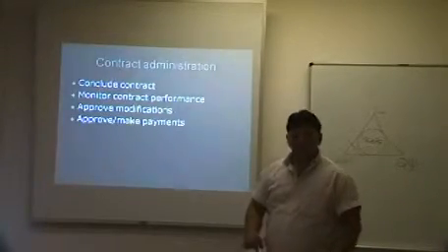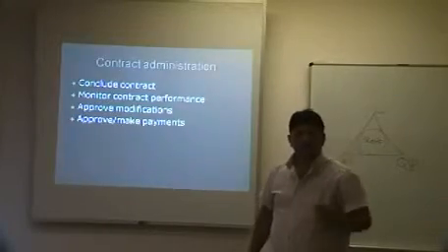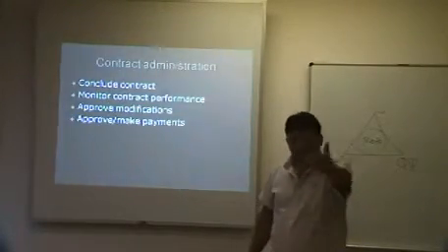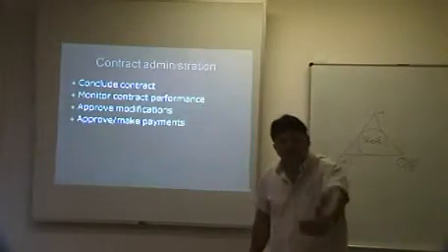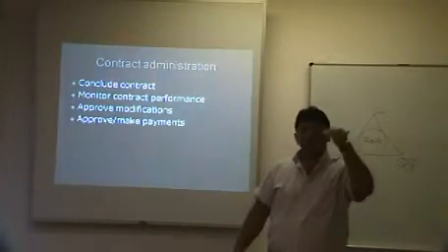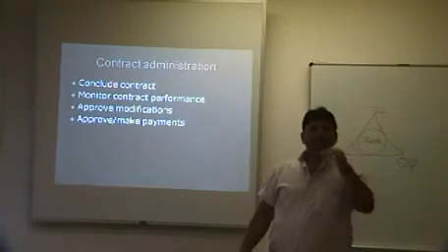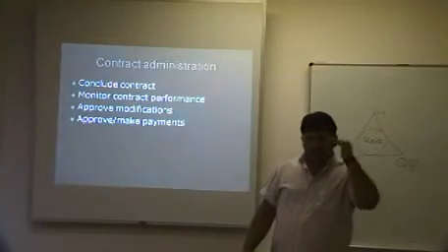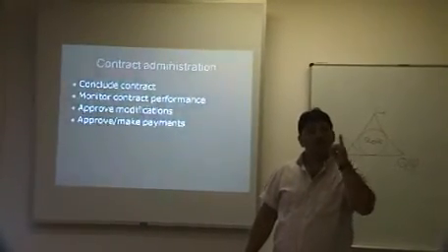Right. Payments will happen as we go along. Work in progress, work in progress. As we progress through the project and through the contract, we will pay the contractor, pay the consultant, based on proof of work delivered, deliverables delivered. We pay based upon that, dependent on the clause in the contract.